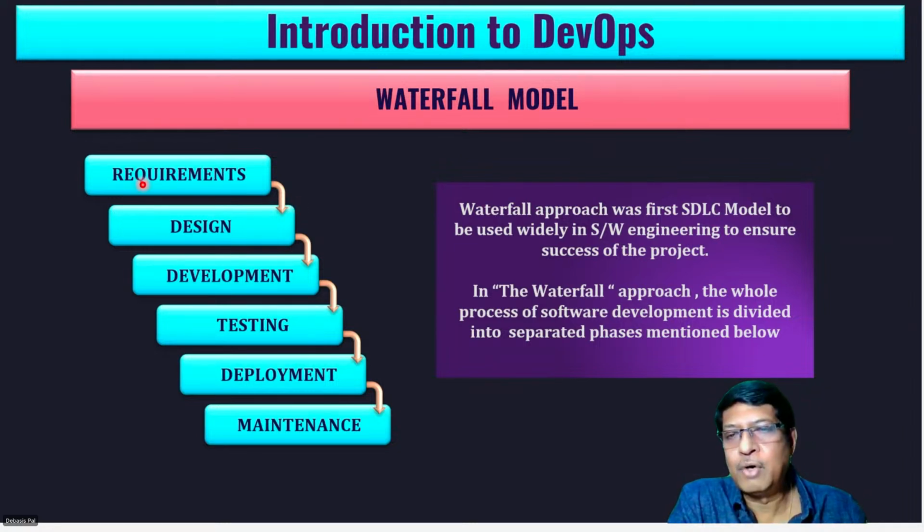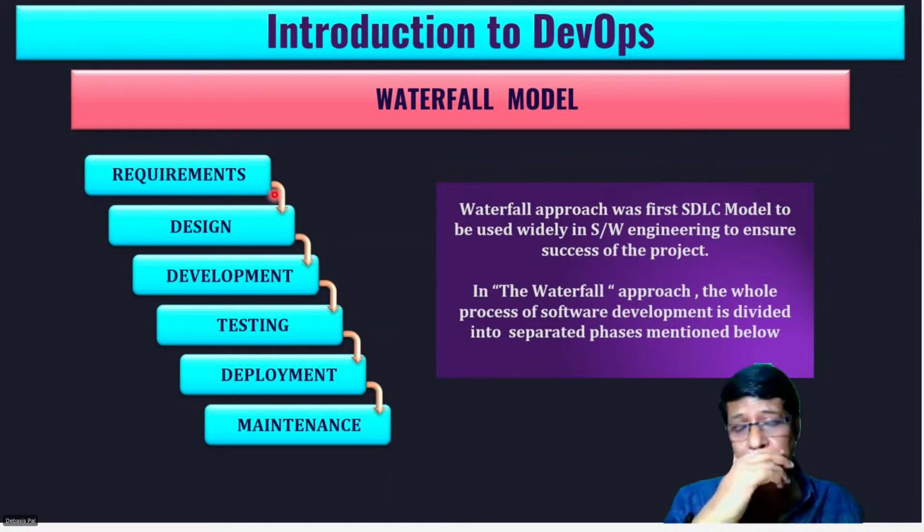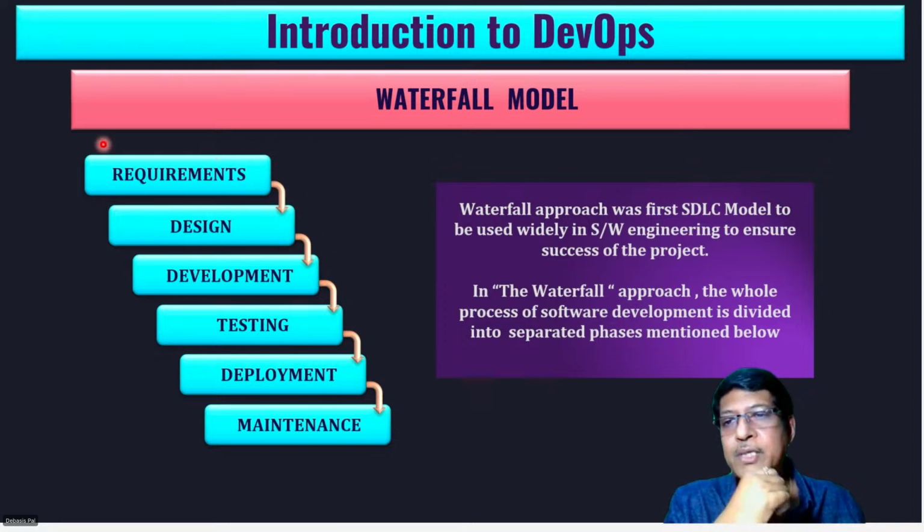You have the business requirements, and you convert that into a technical design. Every phase will have an exit gate, so there is an approval process. The requirements are frozen at the very beginning.